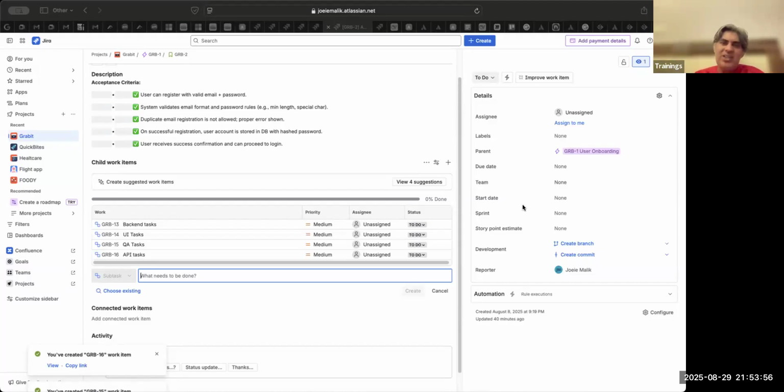Because ultimately it is not about the points. It's a useless exercise, whether it is 5 or 8. Or the team can go with 8 also. No problem. If they think in their mind it is 8, fine. Let them go with it. The only point is that they have a discussion so that clarity emerges in the requirement. Let us say Kiran was supposed to do this requirement story. On the 4th day, he is sick and out. Because this discussion has already happened, Wasim also knows the details of this story. He can also pick it up.